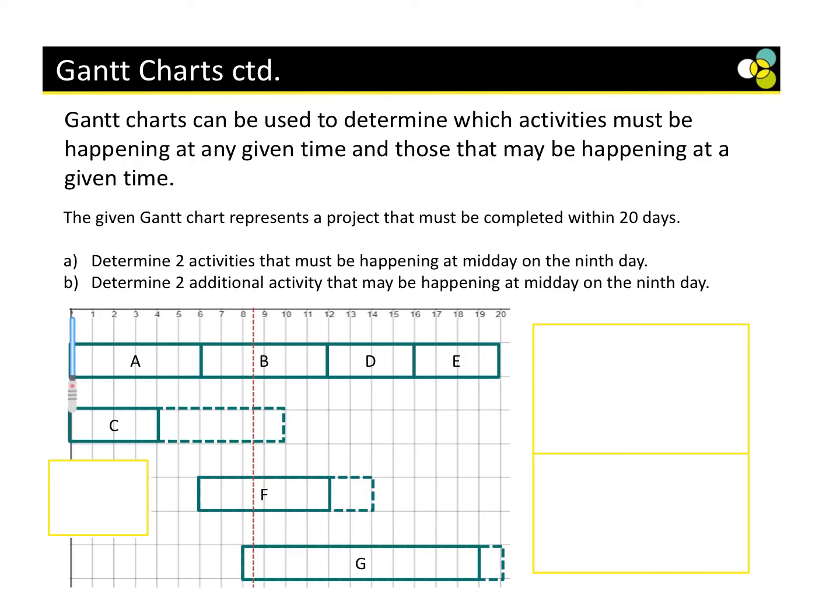If I was to say midday on the first day, it's actually in between 0 and 1, because midday on the first day is 12 hours after we started. 12 hours after we started is in between 0 and 1. 0 is 0 hours, 1 is 24 hours. Watch out for this.